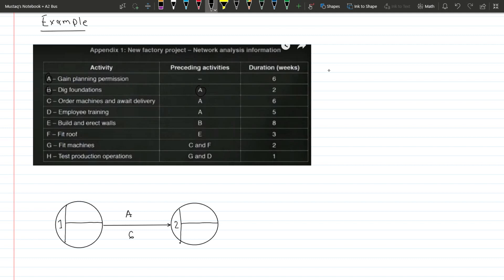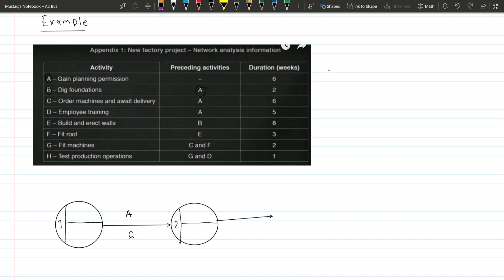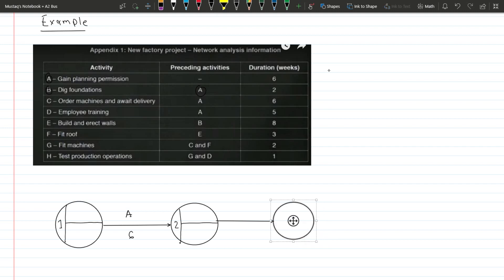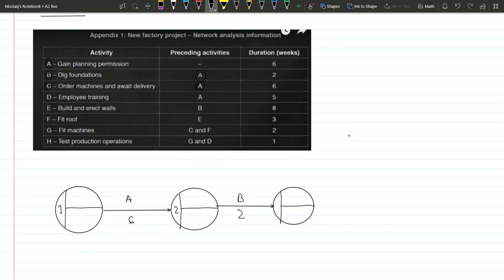For activity B, the preceding activity is A, meaning we can only start B after A is done. The end node for activity A becomes the starting node for activity B. We draw the B node, add the circle with segments, write the activity name B, and its duration of two weeks. For activity C, the preceding activity is also A, so when A ends we can start C. We branch out from A's end node to draw activity C with a duration of six weeks.